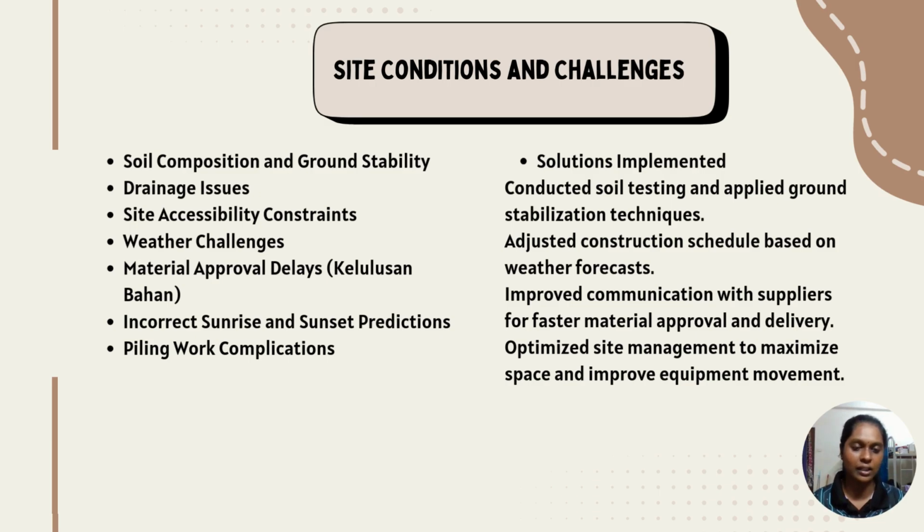And then lastly, the solutions implemented: we conducted soil testing and applied ground stabilization techniques, adjusted the construction schedule based on the weather forecast, and also improved communication with suppliers for faster material approval and delivery. And lastly, we optimized site management to maximize space and improve equipment movement. That's all from me. Thank you.